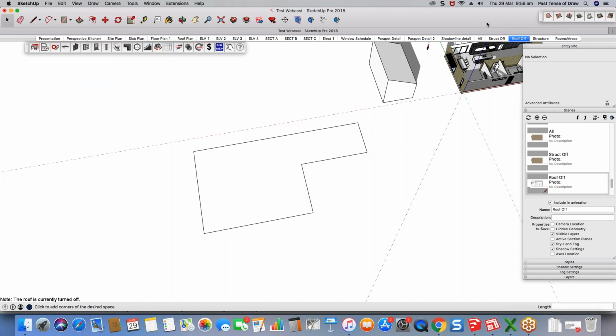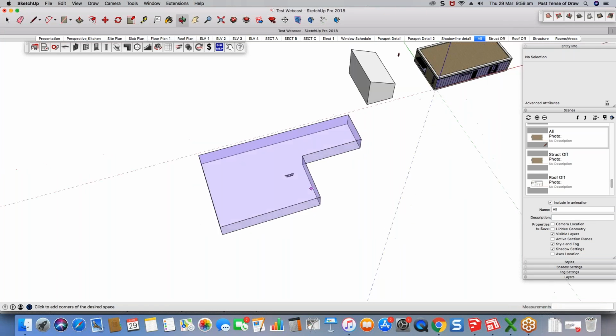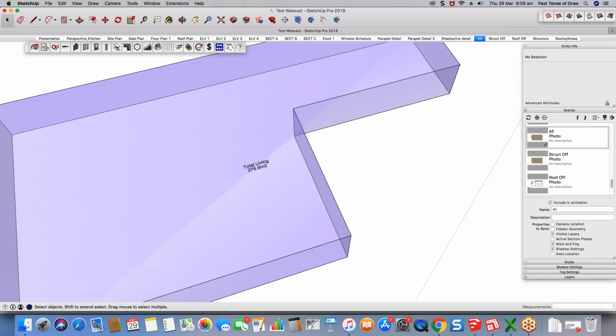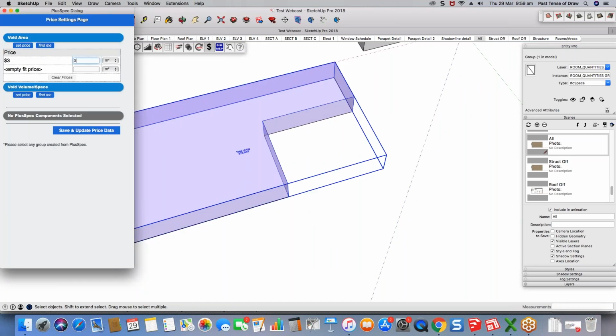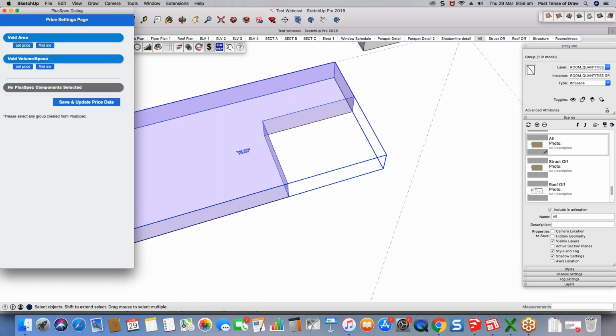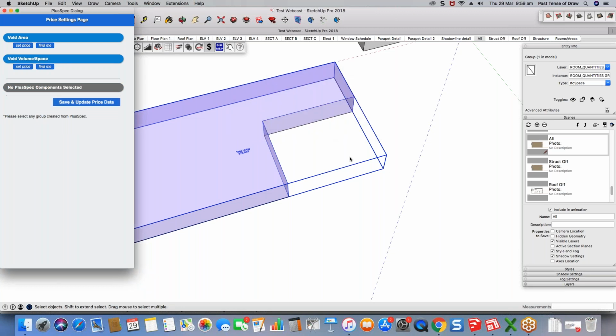And obviously if I click on it and click on the pricing tool, it's going to give me the ability to associate a price to this. So I might say my total living, and at the moment I'm just bypassing this by saying void, but we will have a distinct category for this in the next release. But anyway, I might say that overall I need to charge 3,500 a square meter or square foot, set price, and then save it. And now, if I do my kickoff, I've now got a price on that.